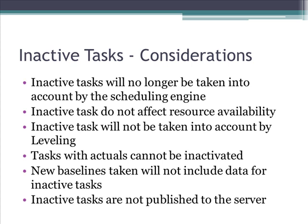Also, if you perform resource leveling, inactive tasks will not be considered. If some actions have been reported over tasks in terms of percentage completed or actual work, you cannot inactivate that task.